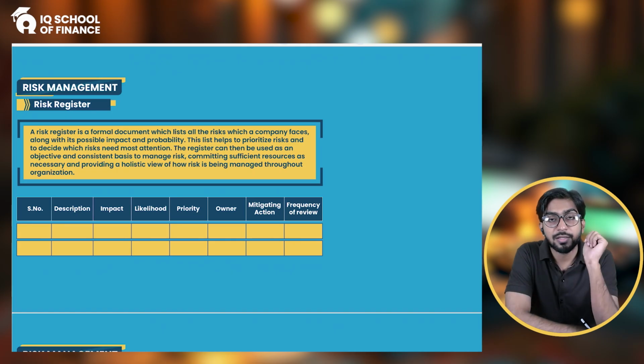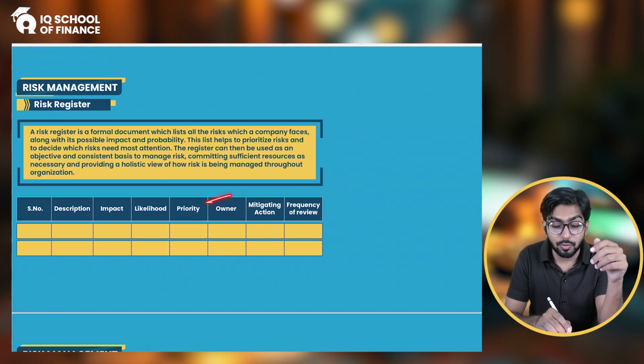So different kinds of directors we have, right? So whatever area there is a risk, we check from which area the risk pertains to, from which department the risk consists or belongs to. So based on that, we make that director or maybe the senior person of the management the owner of that risk.